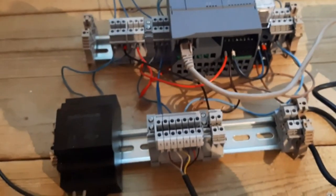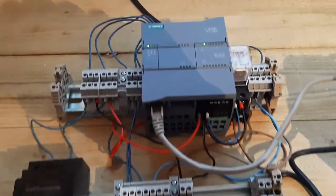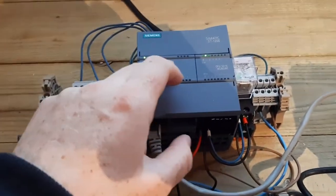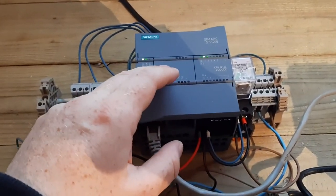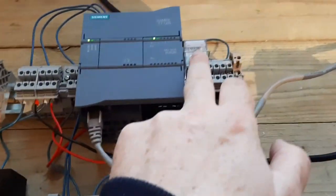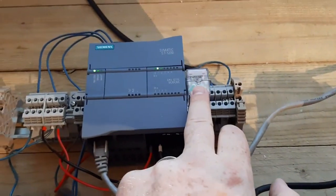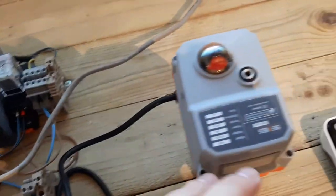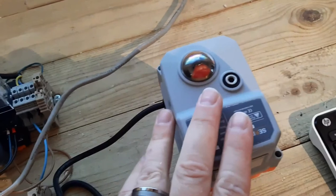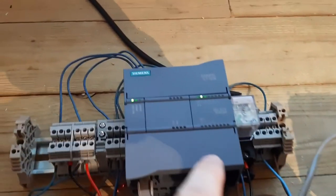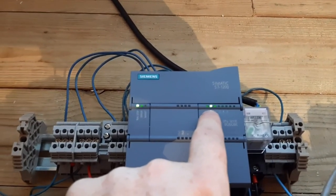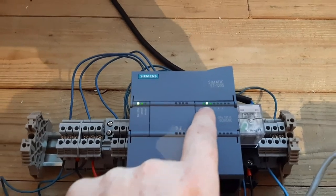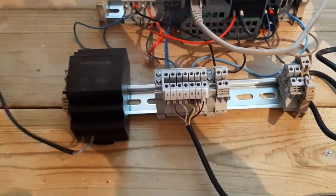I'm doing a functional test here. I've set up a rig with an S7 1200 Siemens PLC. The concept is that once this relay energizes, it sends power to the valve to open, and then I also have the reed switches open and closed wired up as inputs as well.